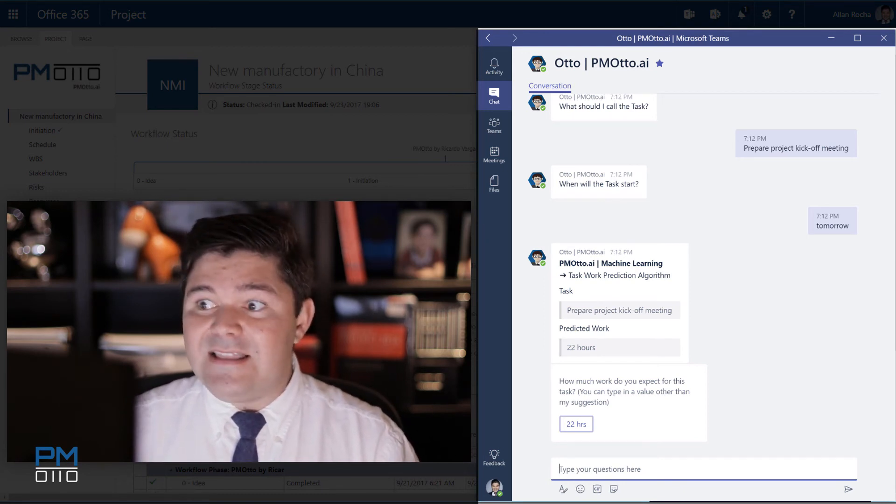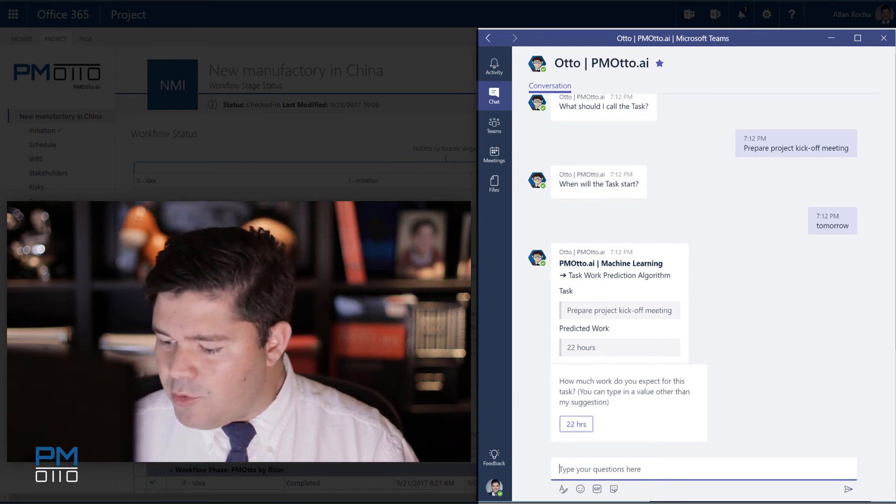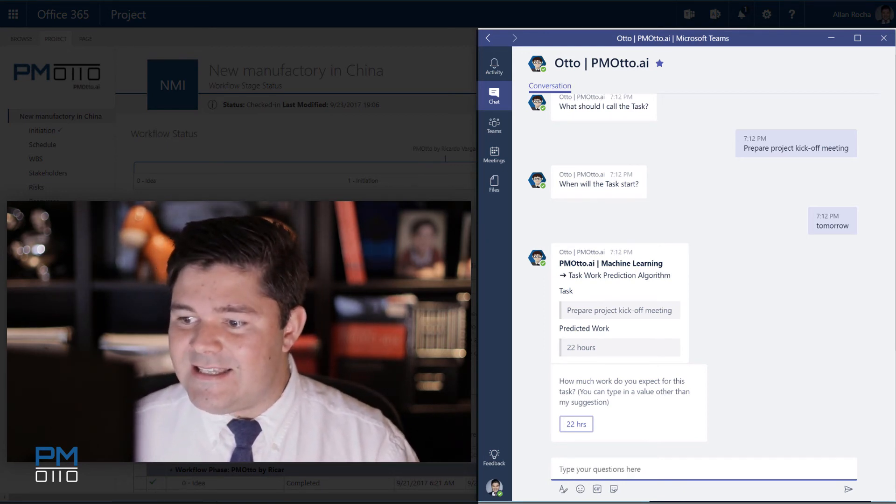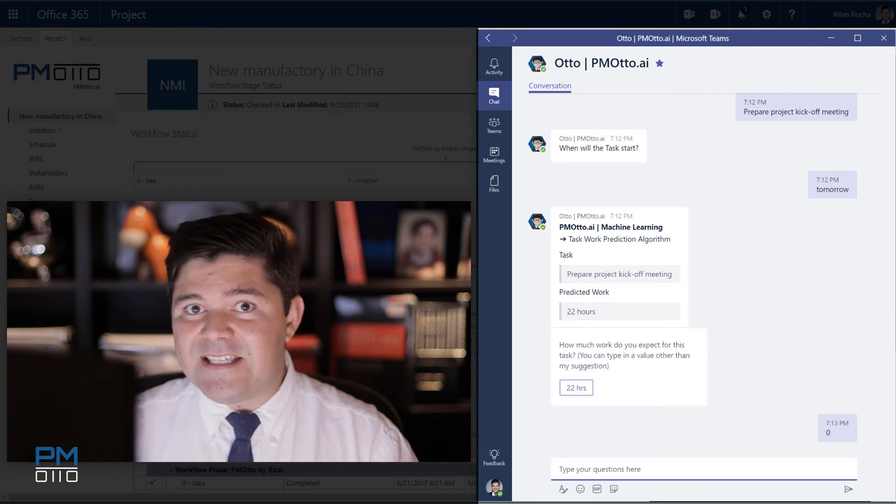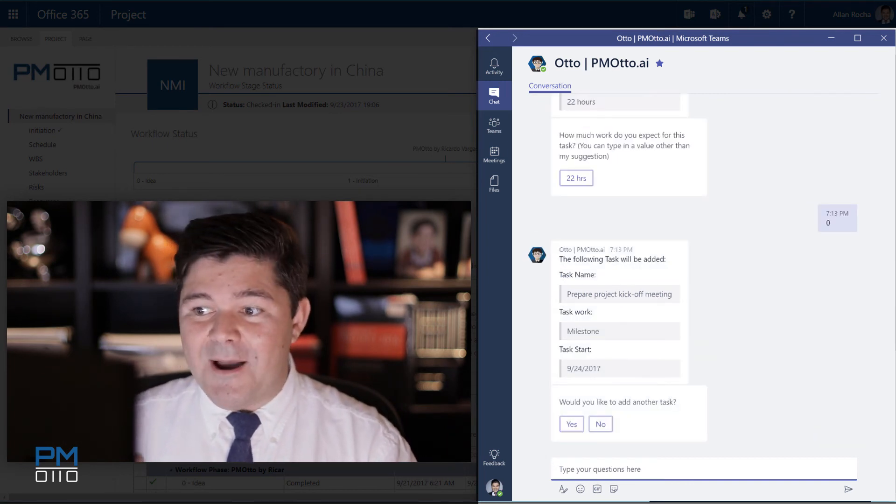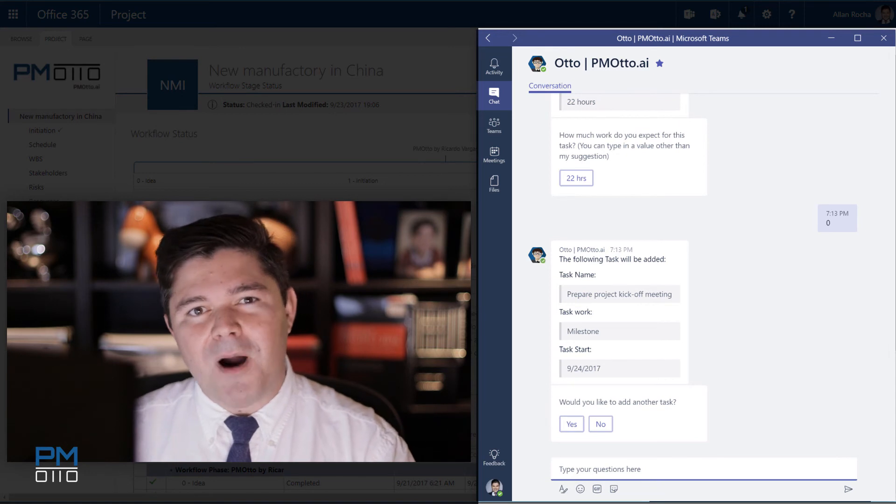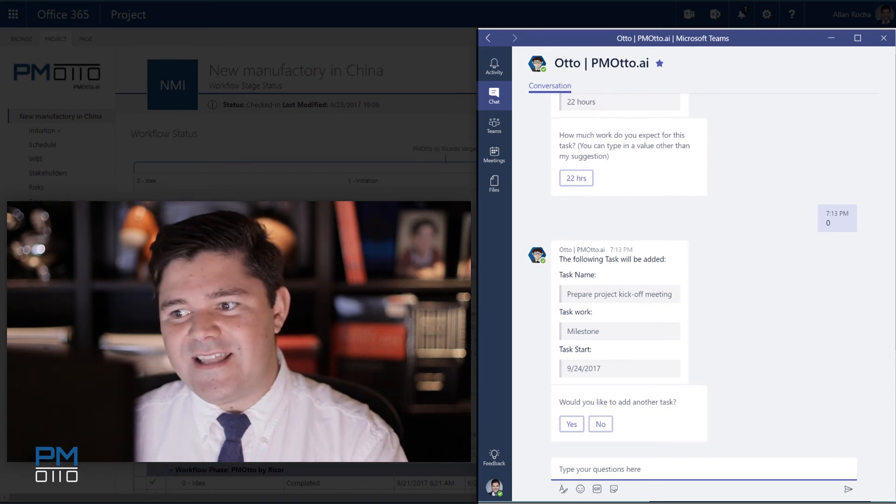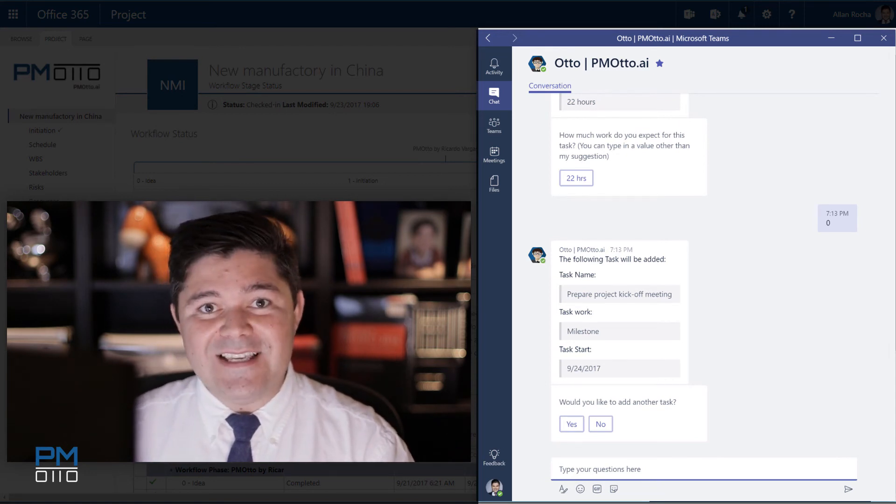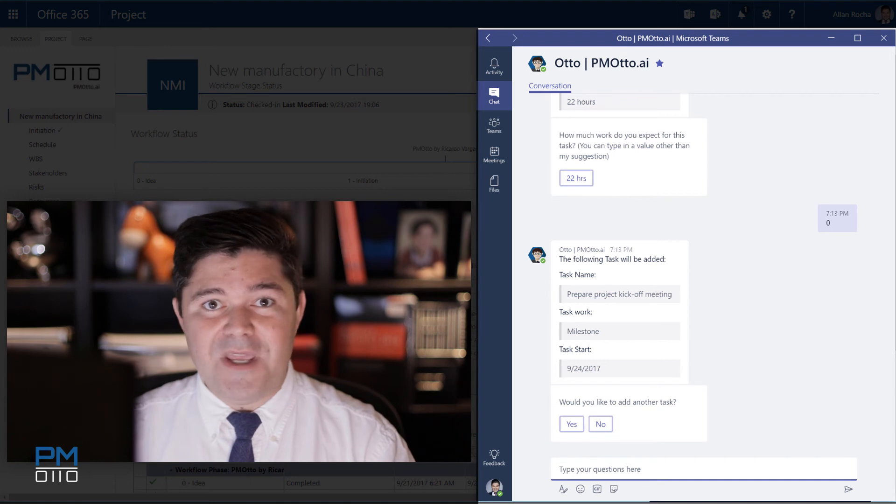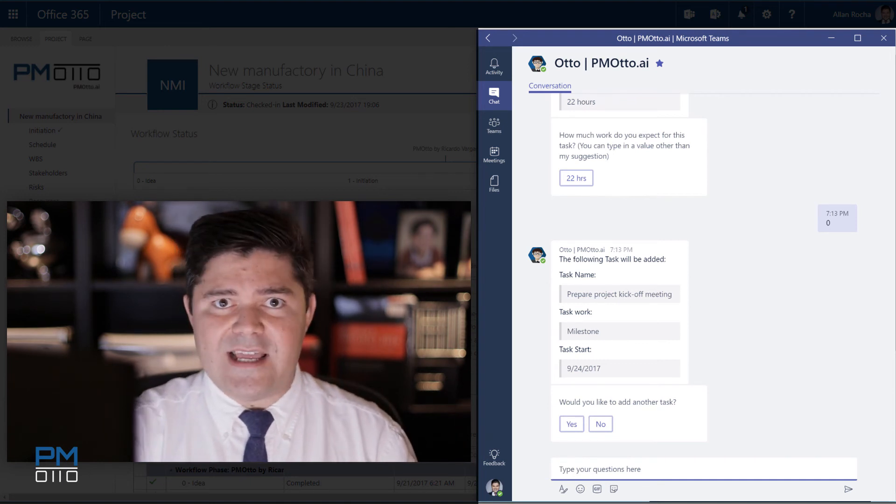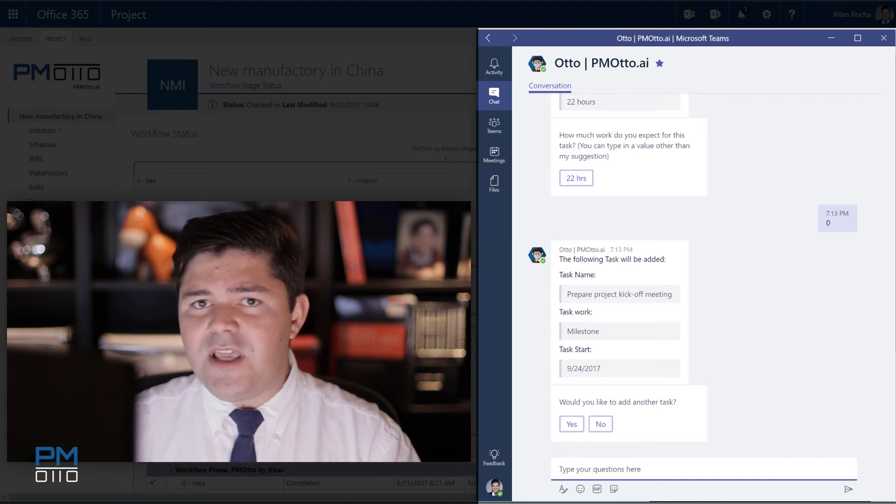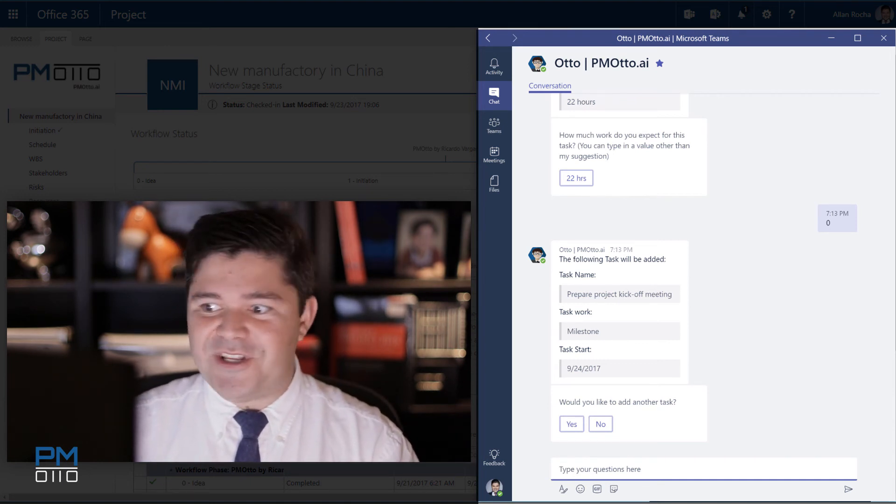But at this time, this will be a milestone. So I would just say zero work. My estimate is zero. PMOtto is smart enough to understand that and it's going to create this task as a milestone for me, not even asking if I would like to assign a resource or even if I would like to change the work time.